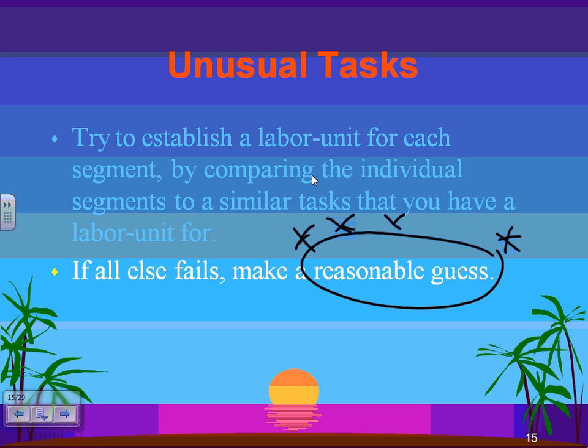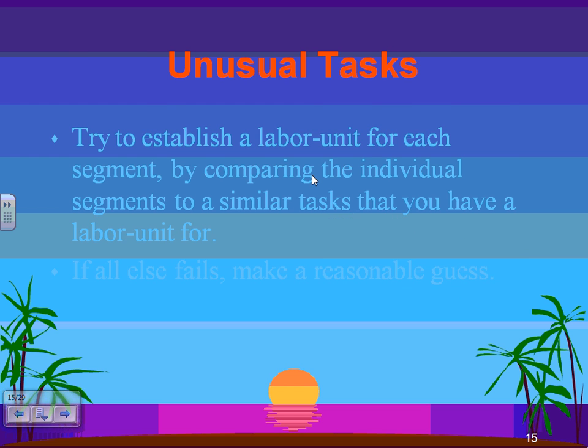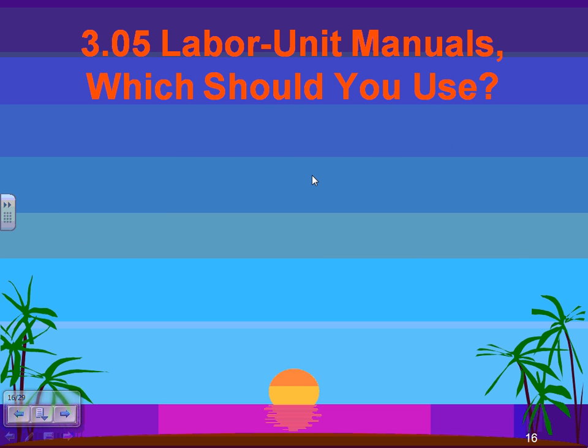Now, if you compare the bus duct to the conduit, based on the analysis that you do in your mind and knowing how the material is, it's probably twice as hard to do, and then it will be 20 for the bus duct. And I'm throwing all these numbers. So that's a scientific guess: you have to know the material and compare it to each other. So that's basically what a wild guess is. Hopefully wild guesses and reasonable guesses are only 5% of your labor. Okay, let me give you guys a 5 minute break and we'll continue.